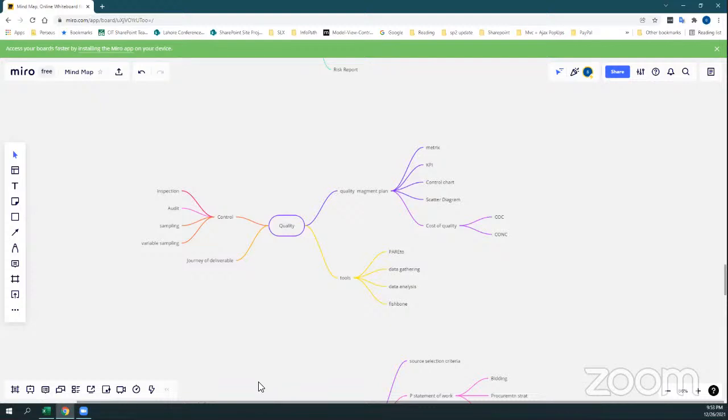After that we have the journey of deliverables. First there is the project charter, then the PMP, then execution. The deliverable goes to quality control; if our internal quality accepts it, it becomes a verified deliverable, and if not, it goes back to execution. After that, the verified deliverable goes to the customer to validate scope, and if they accept it, it becomes an accepted deliverable.